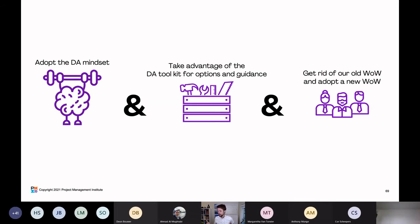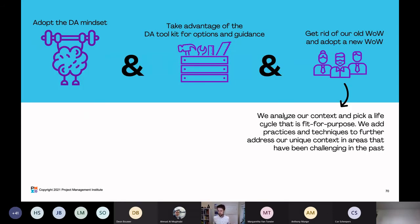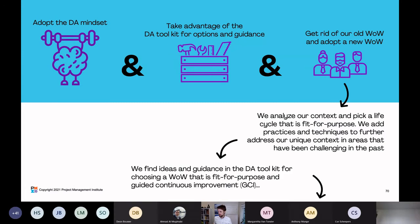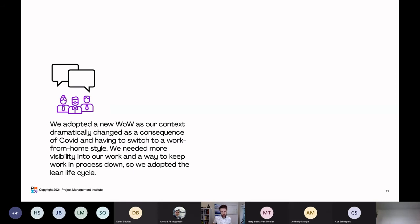The third scenario also starts with adopting the DA mindset and taking advantage of the DA toolkit, but it's more drastic — they want to get rid of their old WoW and completely adopt a new one, because there's been too dramatic a change in their context. The team adopted a new WoW as their context dramatically changed as a consequence of COVID and having to switch to a work-from-home style. They needed more visibility into their work and a way to keep work in process down, so they adopted the lean lifecycle.